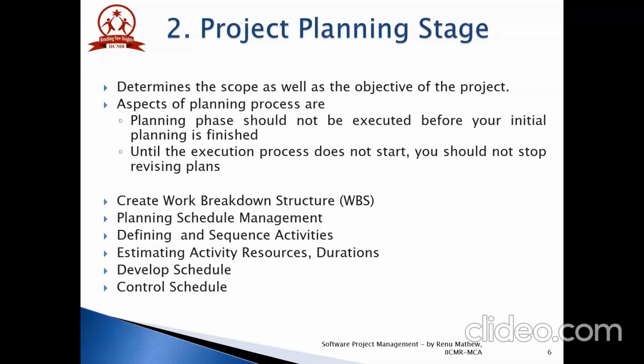It generates a schedule model with planned dates for completing project activities. The input of this tool includes schedule management plan, activity list, activity attributes, network diagram, activity resource requirements, resource calendars, activity duration estimates, project scope statement, risk register, project staff assignments, enterprise environmental factors, and organizational process assets.